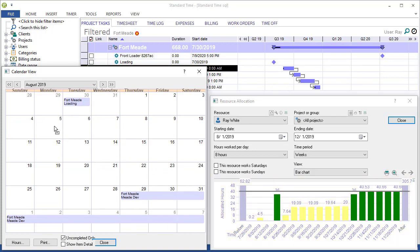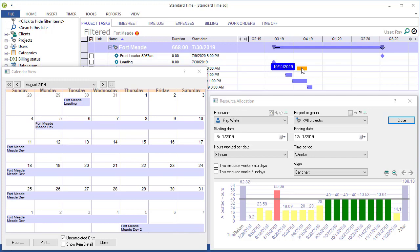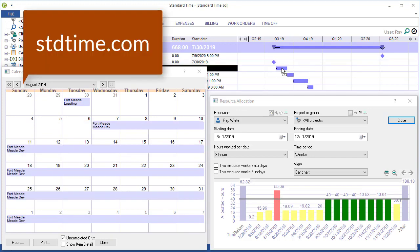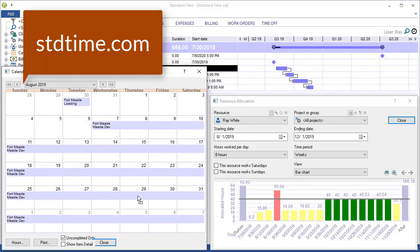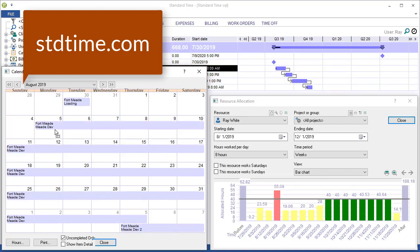So it's just another way for you to reorganize or reschedule tasks so that your resources are not over allocated or under allocated. So again, you can drag and drop them here in the Gantt chart or right in the calendar. Either way will update the resource allocation bar chart that you see here.